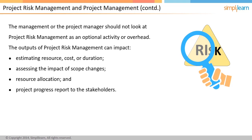On the other hand, some of the outputs of other project management processes — such as work breakdown structure (WBS), estimation of schedule and cost, and assumptions — are important prerequisites for project risk management. Let us first discuss how we can make the risk management process effective.